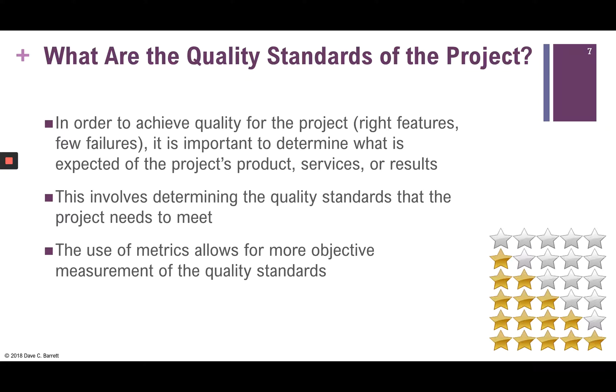Going hand in hand with standards is the concept of metrics, which allow for more objective measurement of quality standards. Take the standard of being on time — that's a good standard, but how do you measure timeliness? The language is not precise enough; we need a metric. For example, if your appointment was at 9:00 AM and you arrived two seconds late, have you achieved the standard?